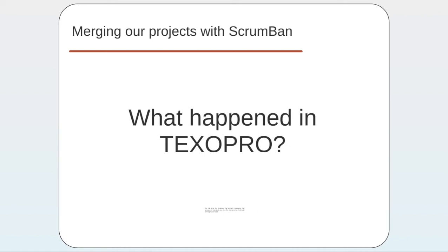So that happened once, and we did that. Let's say we finished that sprint X, the 2 weeks that we had left of it, and we took the PBIs to the next sprint and finished them in 3 weeks. Altogether we had taken 5 weeks to develop and produce those urgent PBIs. From the product owner's point of view, it was not acceptable, and for the customers who were willing to get their new requirements, waiting for a month and a week was not acceptable at all.